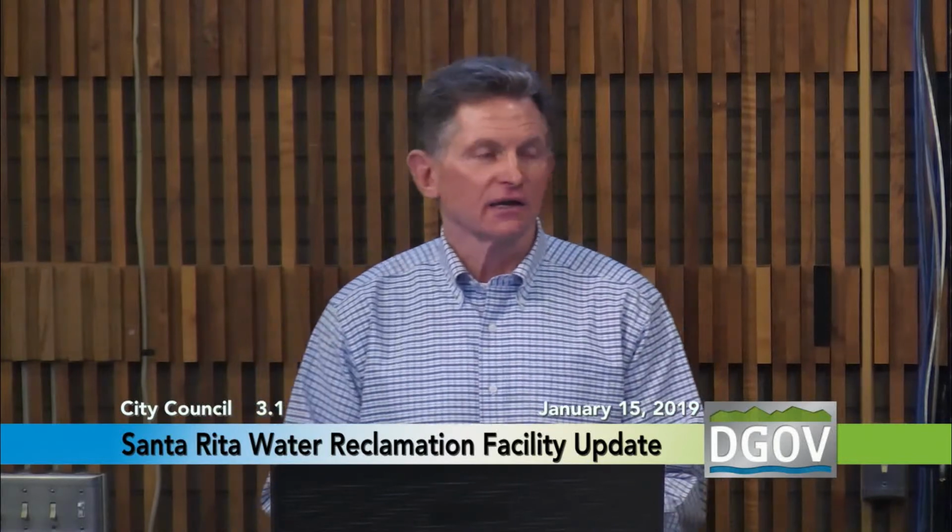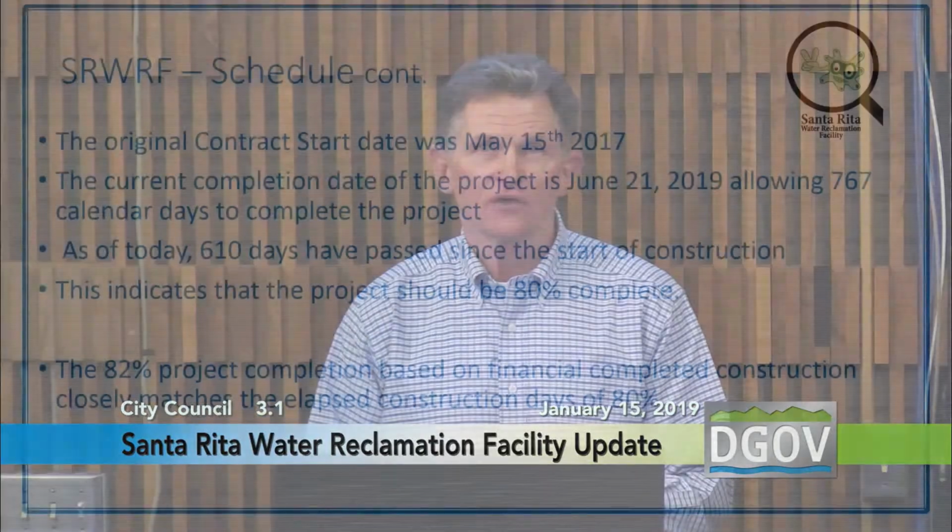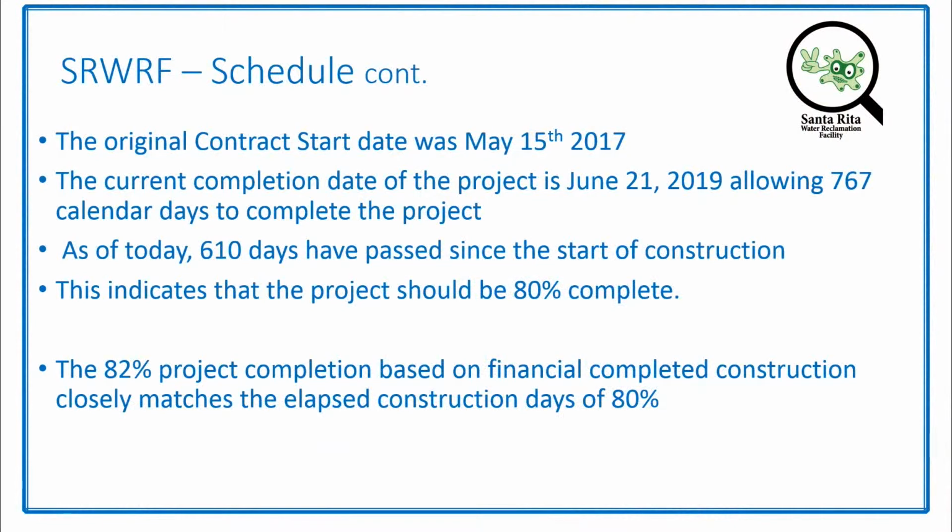So looking at it a little differently, the original contract start date was May 15th of 2017. As of tonight, we've used 610 days of that contract, which is 767 days. If you do that math from a scheduling standpoint, it looks like we're about 80% complete. So that's just a verification between the financial status and the schedule status that we're right around 80%.